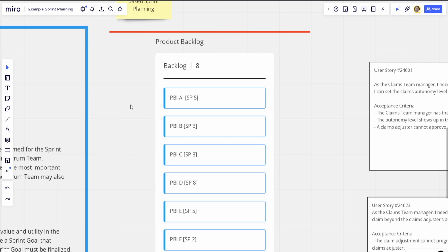There's an understanding that the higher complexity items will take more effort by the team, and story points are a team-based estimate of the size and complexity of that work. So an 8 is going to be far more complex to do than a 3, relative to each other. That's a topic for another video.